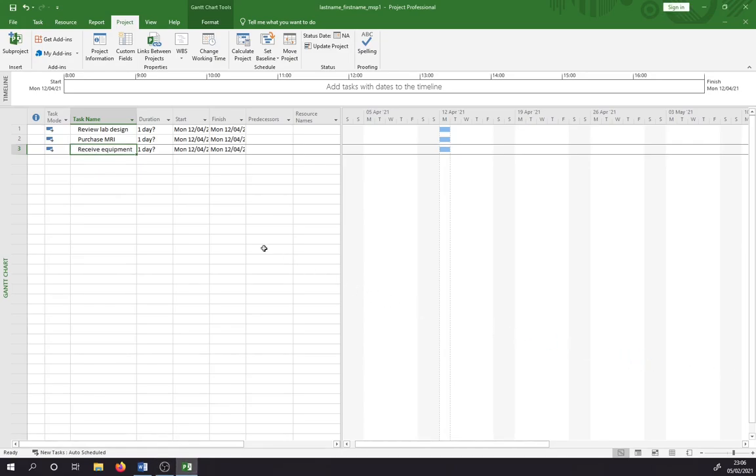So you can see now the task bar, because we actually set the option in here to auto schedule. So we know it's going to be definitely auto scheduled when you see this little blue bar with a grey arrow. That just means everything's going to be auto scheduled. So again, Microsoft Project is going to do the work for us. By default, when we don't put in the information on how long it's going to take, Microsoft Project just sets that to 1 day, and it always puts a question mark beside it. So that's just a reminder for us that we have to go back and put in a duration at some stage. So if we don't put in a duration, Microsoft Project will put up a little question mark, and again, it's just to remind us that we need to add a duration. So we'll do that a bit later.